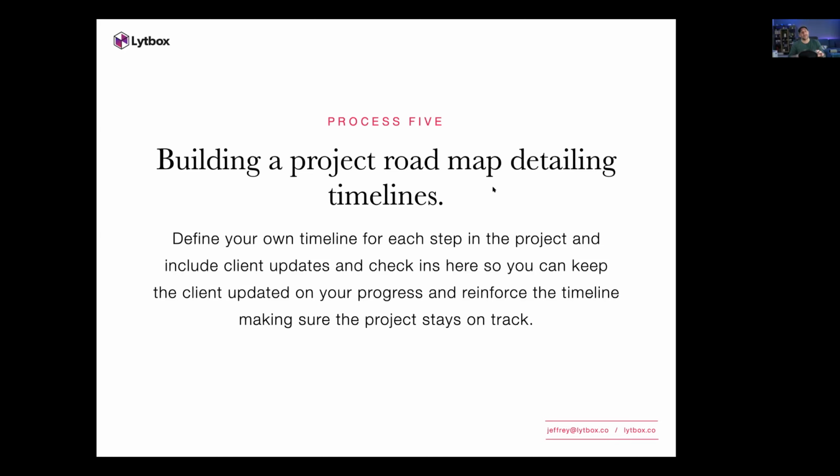So when you have something in place, you're able to follow up with the client. Like, hey, just want to let you know, we just finished week 1. We got this done, A, B, and C. We're on track. Now this is what we're looking at. This is where we're going. Let's go ahead and have a follow-up call. Do you have any questions? Something like that in place. So you want a timeline schedule and a roadmap. That way you could keep your client updated with the progress, and you could also reinforce that timeline, making sure the project stays on time.